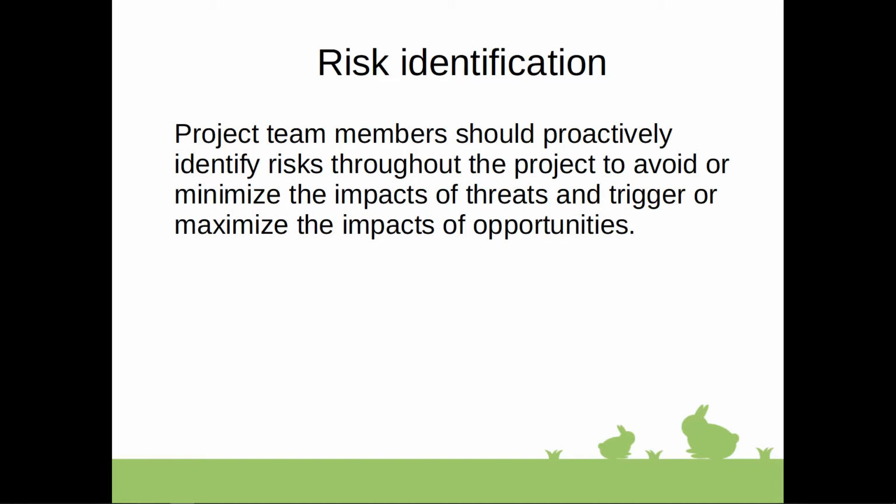There are two ways to identify risks. First, you identify root causes and analyze the impact that these risks might have. Or you can identify the essential functions that the project team or the company must perform to reach the goal of the project, and identify how these functions can fail in reaching this particular goal.